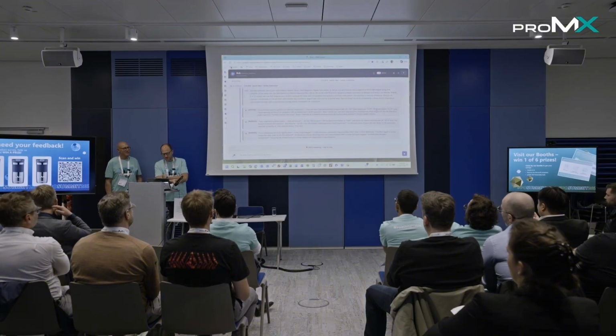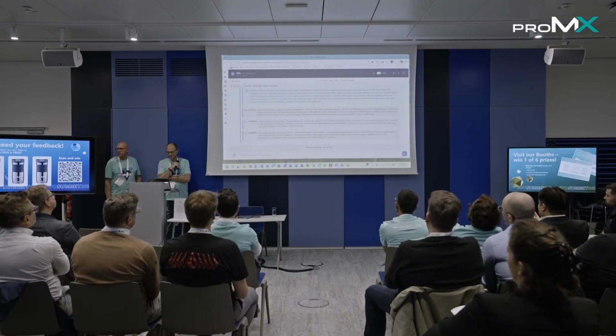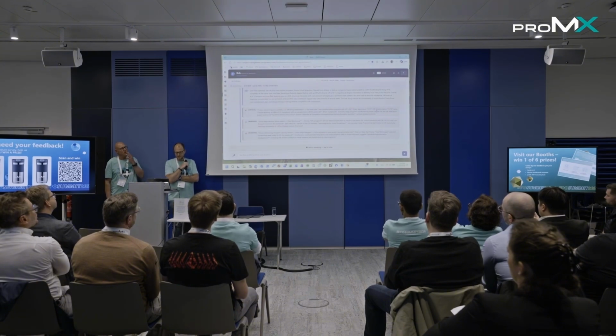Weekend, one of your most visible programs, Azure Cloud Migration, flipped from amber to red as cost performance deteriorated to a CPI of 0.84 despite being 1% complete. At the same time, the data warehouse rebuild slipped further with an SPI of 0.45 and CPI of 0.73, signaling a deeper estimation or delivery issue early in its life cycle.